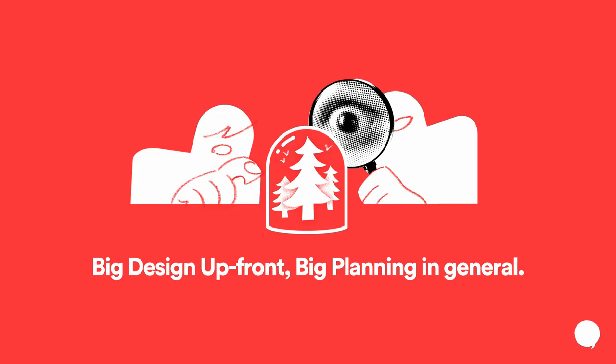This typically happens in discovery phases or planning and spec phases of different kinds, where you're doing only information architecture, just planning, speccing. A lot of people can't let go of this desire to do a lot of planning up front but still want to do agile, so they'll do something called sprint zero. They'll say, okay, we'll do agile, we'll only do sprints, but sprint zero is the one where we just do all the planning.